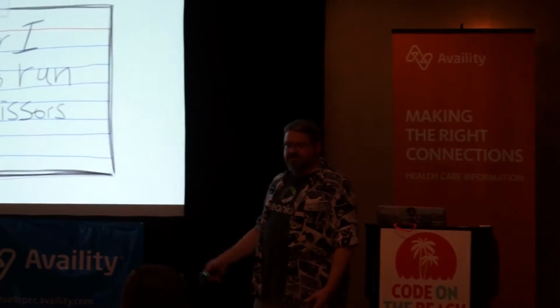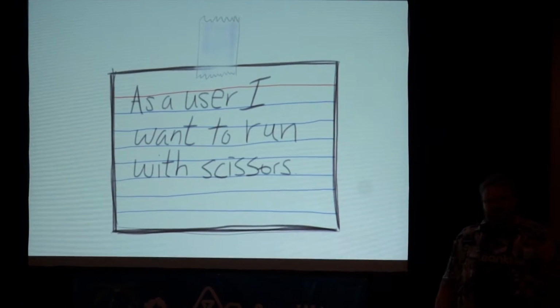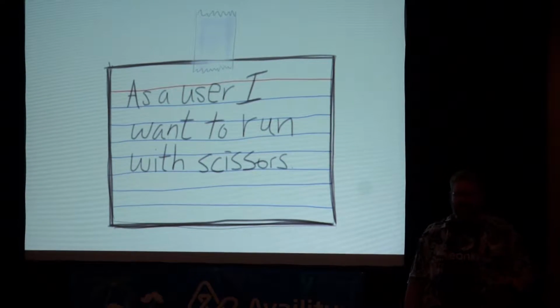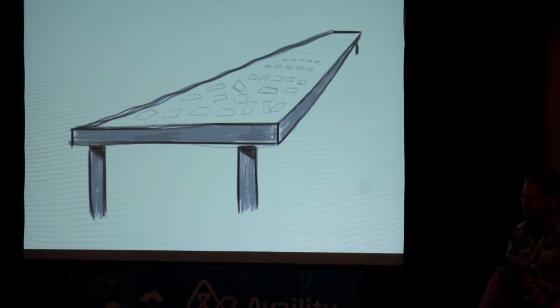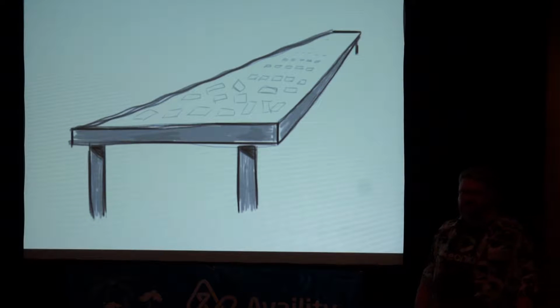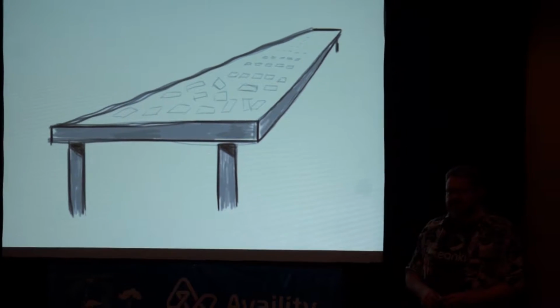He instructed us to start writing down all the features and things that this customer would like to have. So we brainstormed and went through their business plan and all that stuff they wanted to do. At the end of that exercise, we spread out all this pie in the sky stuff across the table, and Chris coached them through figuring out the minimum set of features they wanted to develop. It's like version 1 of their application.